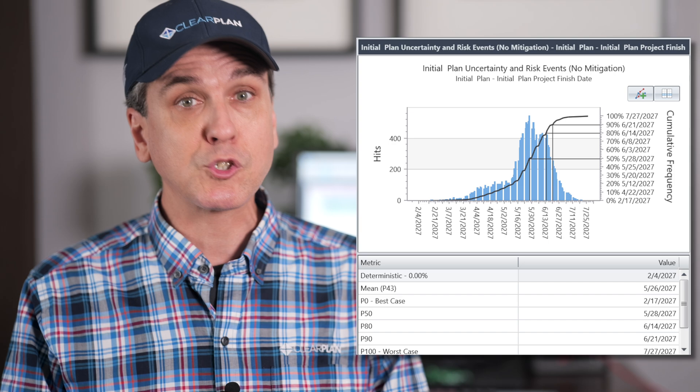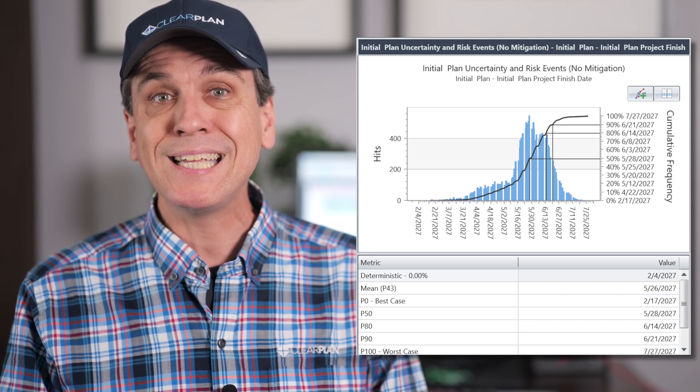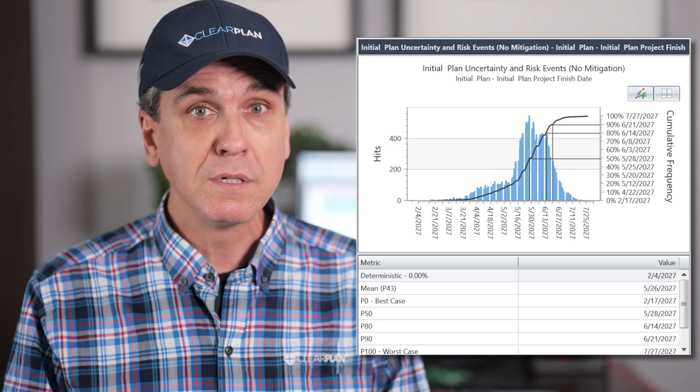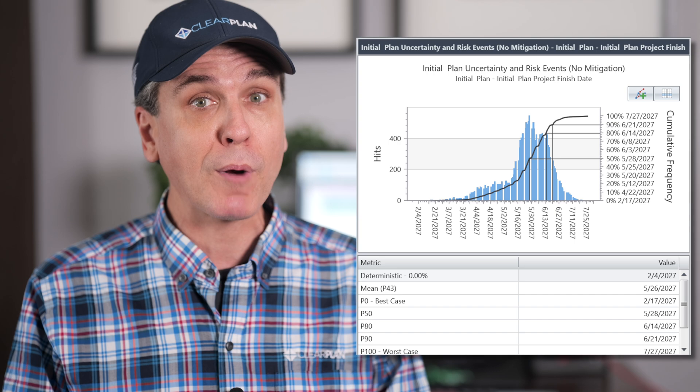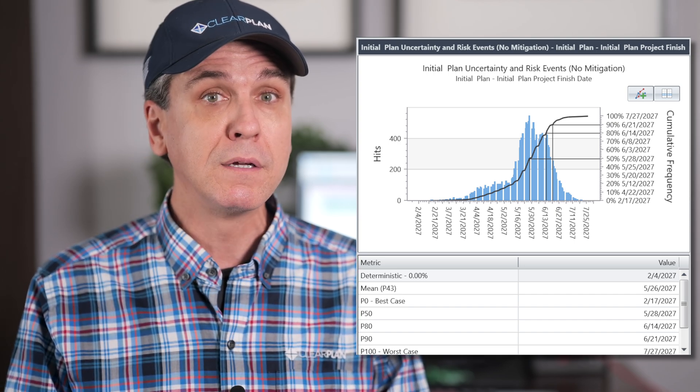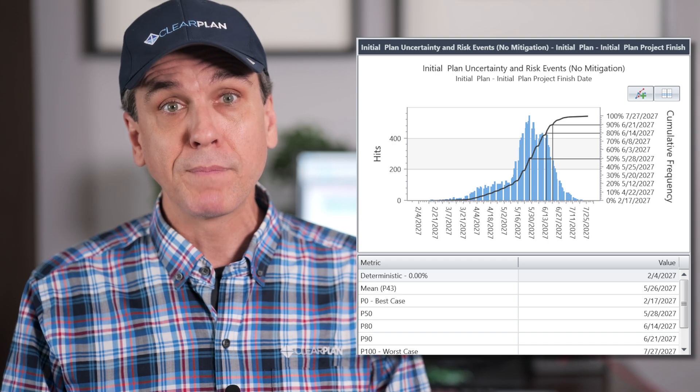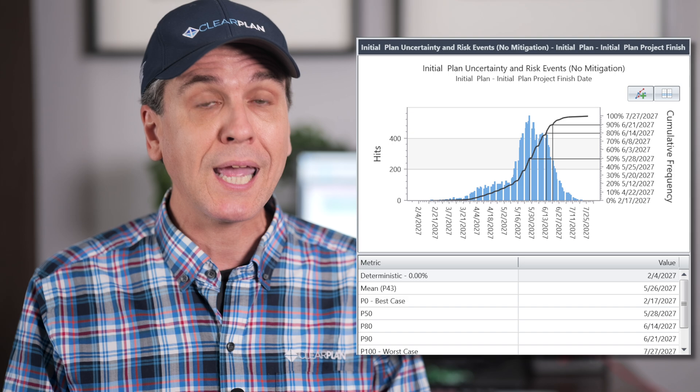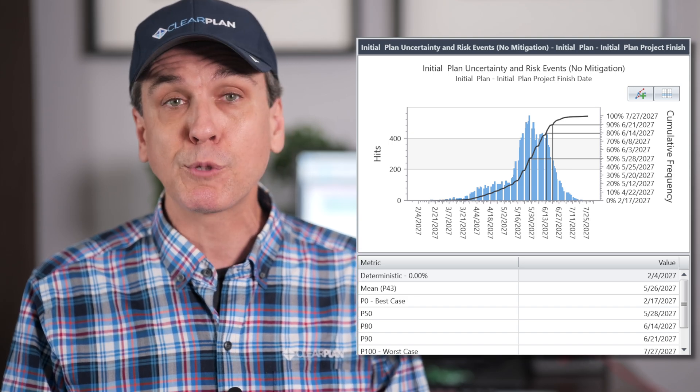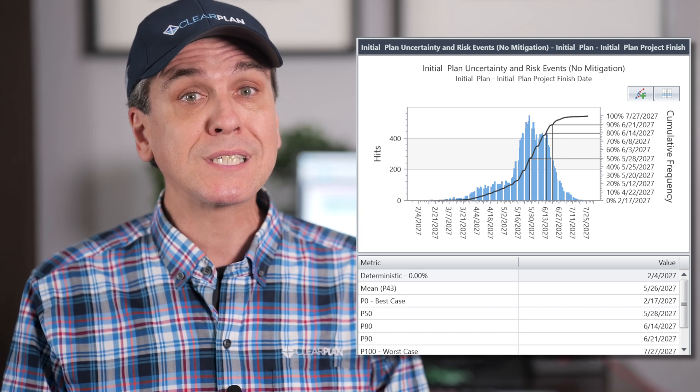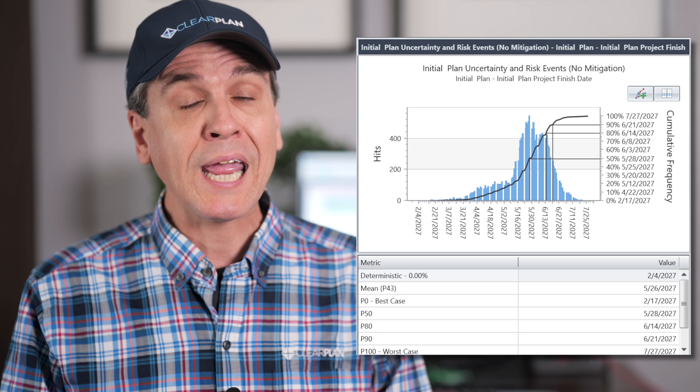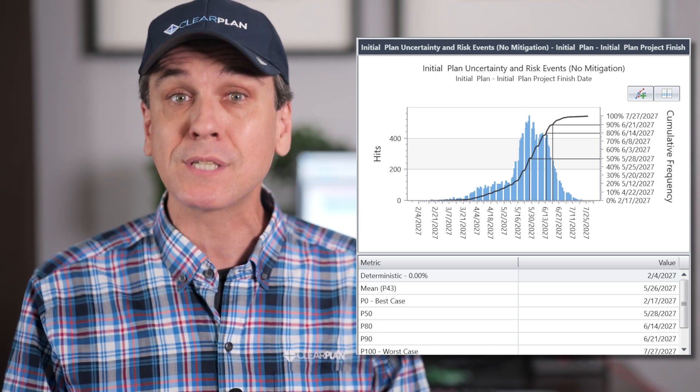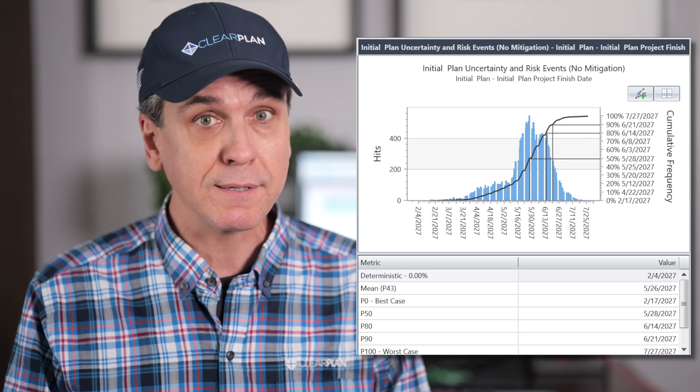Let's start with an extreme example. Your deterministic finish date has a P0 level of confidence. This means that all risk-adjusted outcomes for your project are later than the finish date in your project plan. This is bad news. This means that the occurrences of virtually any risk and any amount of uncertainty will cause your plan to be delayed. In this case, review the schedule itself for reasonableness and assure that your uncertainty and risk assignments are not overwhelmingly pessimistic.